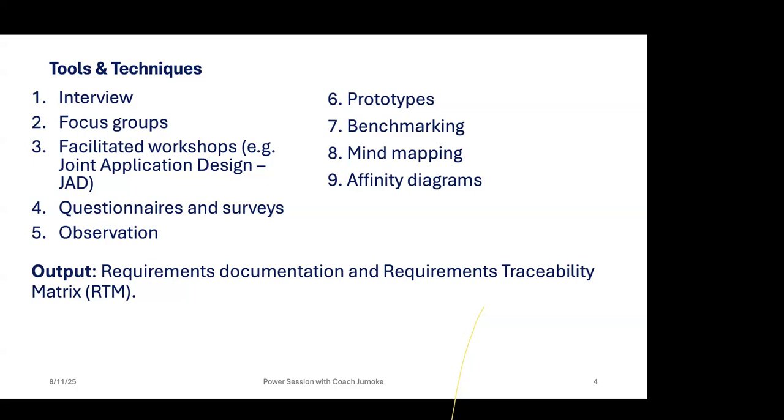So you trace each requirement within the project to be able to, let's say, 3 bedrooms, you have to build 3 bedrooms, maybe duplex. If somebody said telepad, you can't trace telepad to any part of the scope of the project, so that will not be accepted. But if somebody says, I want a shower in my bathroom, you can trace that to a bathroom in the structure. So that's what requirement traceability matrix would help you achieve.